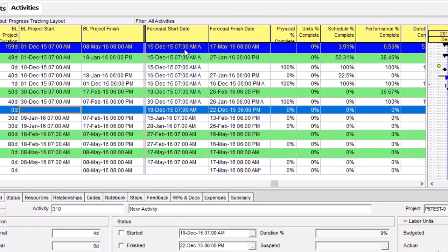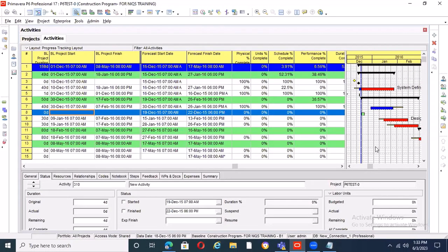But hey, we are not good on time. We are good on cost, but we're not good on time. So for us to now gain more time, we have to re-strategize. That's the story. So if you just base your judgment on this, we are 5% ahead of schedule. That's not true. Yes, cost, you're looking good, but time, no.